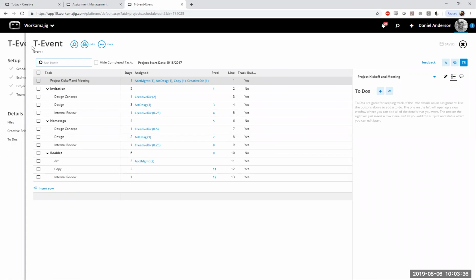So basically saying, hey, these are the typical task lines that would go into an event style project. This is the order that these tasks can occur in, and then the number of days that those tasks take. And what that does in a traditional project sense is it allows us to project, based off of a start date, the timeline for your project as a whole, as well as each task within that project. So that's more of a critical path or waterfall style project management.